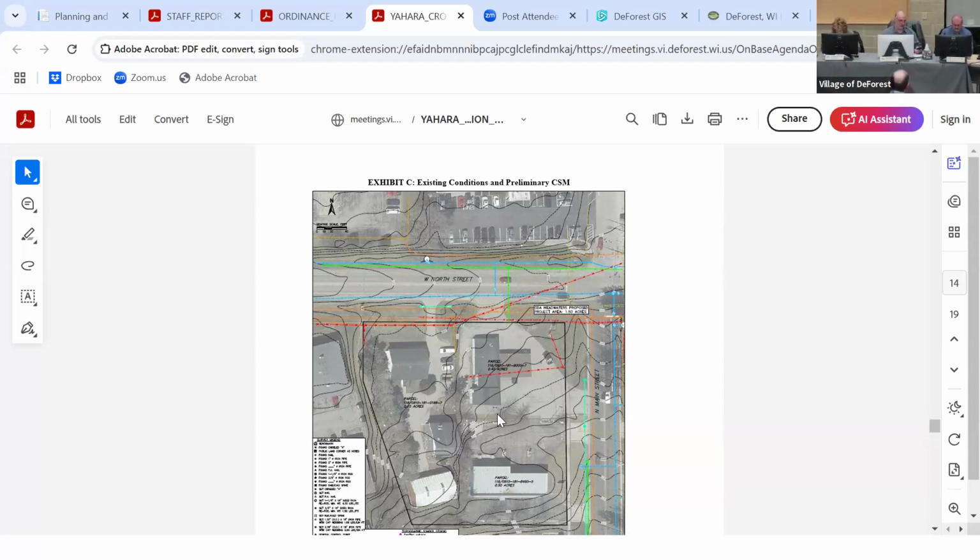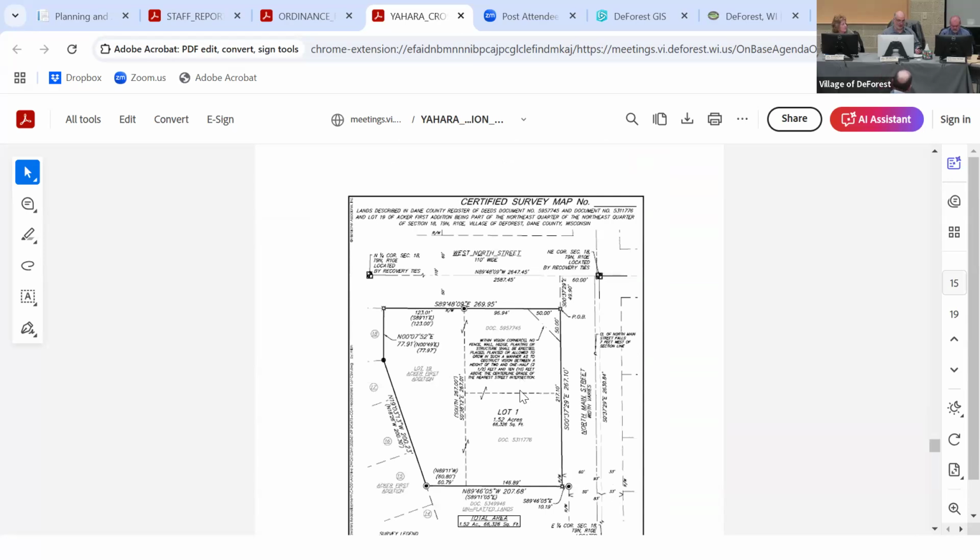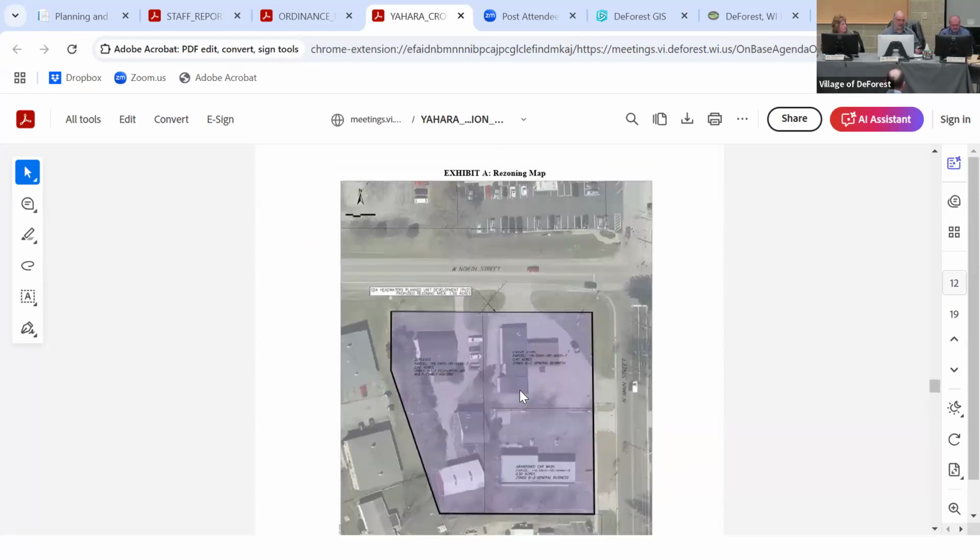Lisa, please correct me, Alex, if I misspoke, but at the last village board meeting, one of my things I was going to report on is that we authorized executing an environmental assessment. And I know at least with the DOT environmental assessments that it would include a hazardous materials review too. Yeah, that is correct. Because this project might have federal funding involved in it, we had to do a Part 58 environmental review. And the village signed off on being the responsible entity for that. So they'd be the certifying officer. HUD eventually has to approve that. I don't know how that's going to happen or when that's going to happen at this point.